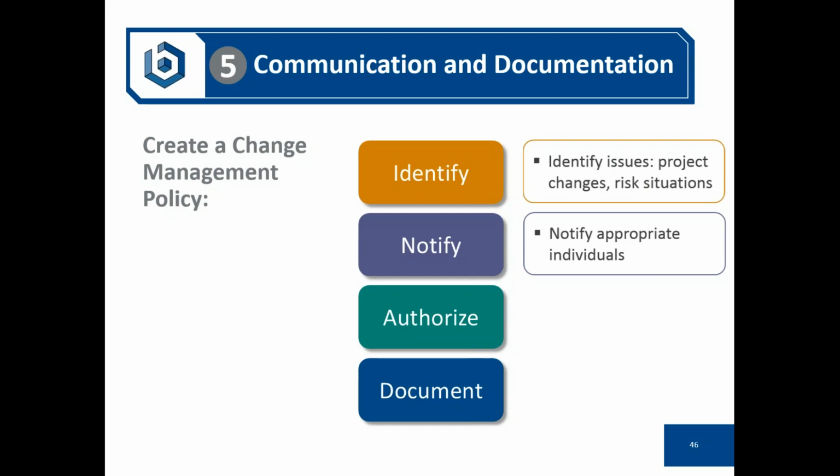They want to change the design of that lab. I said this could cost us a lot of time, a lot of money for our consultants and the like. The project manager needs to know this, and they need to know this before you do the redesign work, because they need to attain approval or authorization for these additional services before they are performed.